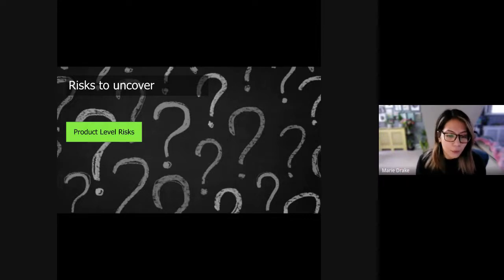So, for example, is the work that you're going to do going to affect multiple teams? That needs to be discussed earlier on. So if you're doing a story about data migration, are other teams aware of the impact? This needs to be fleshed out as early as possible, and you can do this in story shaping.